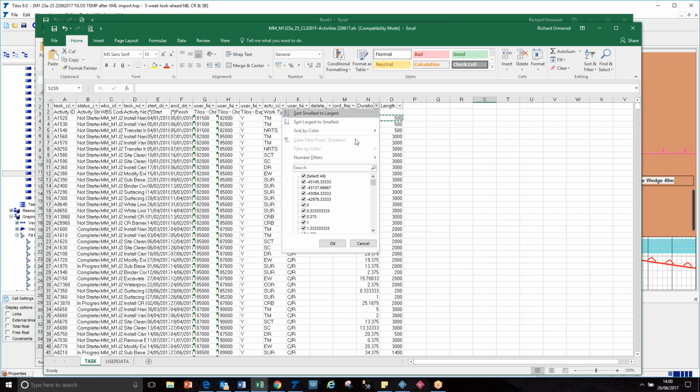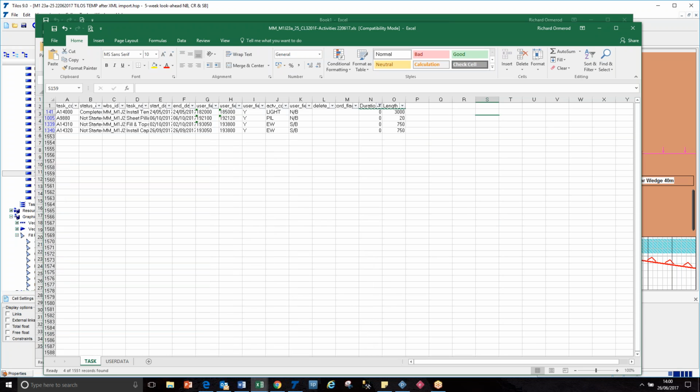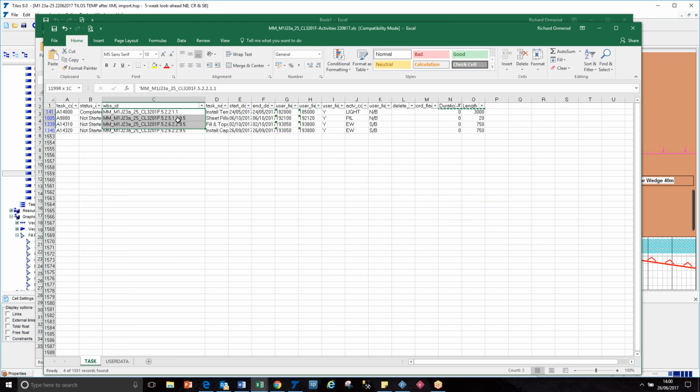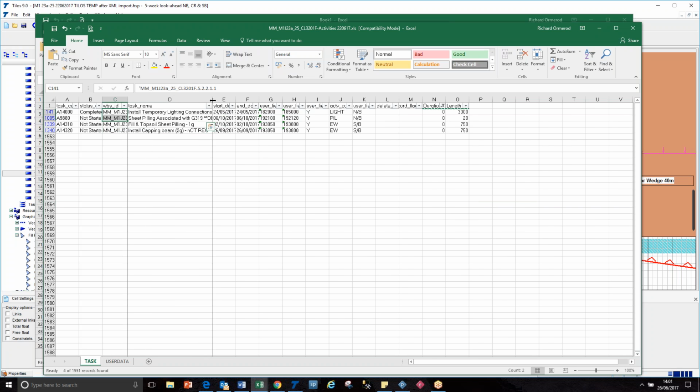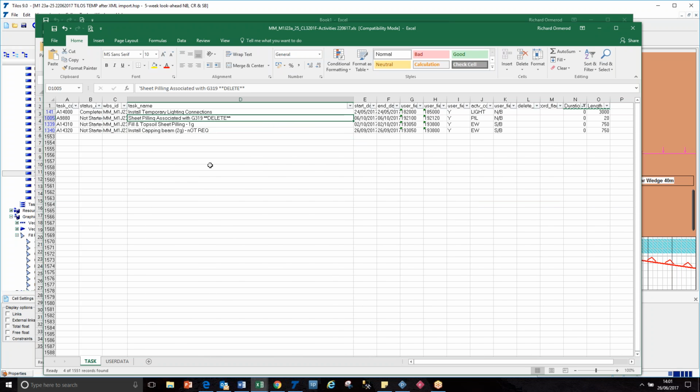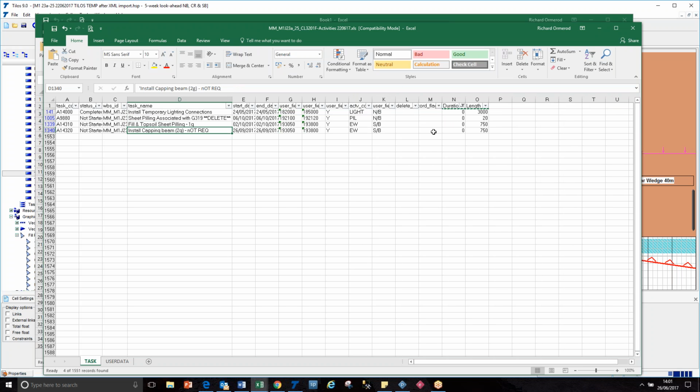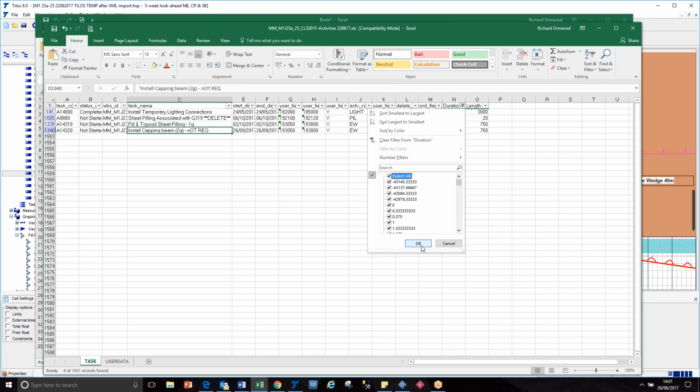And you've also got anything that's a milestone, and they've got some length, so that could be a horizontal line. But a lot of those descriptions seem to be, oh, that's a WBS. It says the word delete next to it, so that makes me feel it needs to come out. It shouldn't be there, and is not required. So it's useful to see where things are missing.